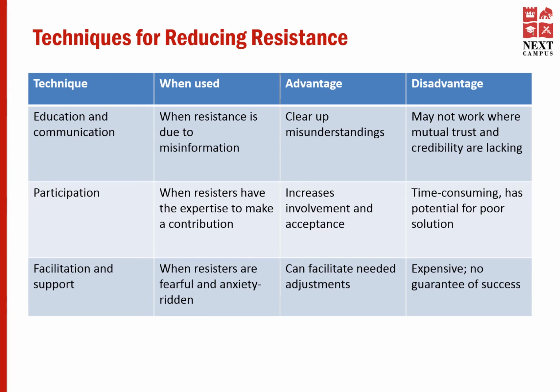When resistance is due to misinformation, this is a good technique. The advantage of education and communication is that it clears up misunderstanding among the people. The disadvantage of this method is that it may not work where mutual trust and credibility are lacking.